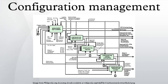The CM process for both hardware and software configuration items comprises five distinct disciplines as established in MIL-HDBK-61A and ANSI EIA 649. These disciplines are carried out as policies and procedures for establishing baselines and performing a standard change management process. CM planning and management: a formal document and plan to guide the CM program that includes items such as personnel, responsibilities and resources, training requirements, administrative meeting guidelines including a definition of procedures and tools, baselining processes, configuration control and configuration status accounting, naming conventions, audits and reviews, and subcontractor vendor CM requirements.